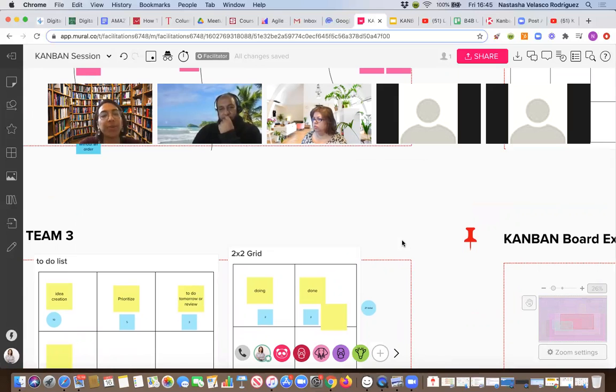Thank you, Susan, because actually you hit on 3 things, on that 3-level analysis that Kanban has. It has the stages of the stream, then it has the status of the work, if it's in progress or done, and then it has the capacity that each stage has to receive work, right? So it's like these 3 levels of information.